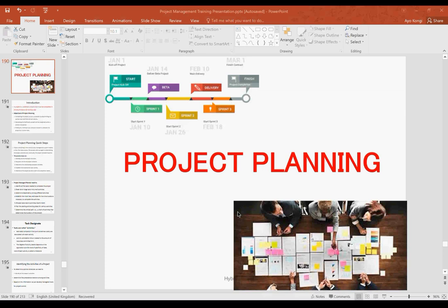So someone might say, okay, let's think about how to cook rice. And the first thing that someone says is, oh, how to cook rice? Okay, add salt. And I'm sure you're wondering, but that is not the first activity. No, what we are doing at this point is just listing all the activities that need to be done. We're not concerned about how they flow at this point. What we are concerned about is listing all the activities. So whenever you are conducting your workshop, or planning workshop, or talking with the team, first, what you want to get out of them is, let's list out all the activities.